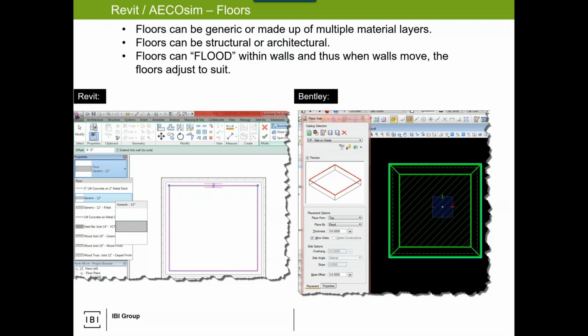That gives me a little more information about the slab. So if I was harnessing that, I can say, oh, it's a slab on grade. It would have less reinforcing, therefore a different cost index. So if I was giving that quantity to a cost estimator, that little bit of information will go a very long way versus, say, an elevated slab or a waffle slab or different other types of slabs.